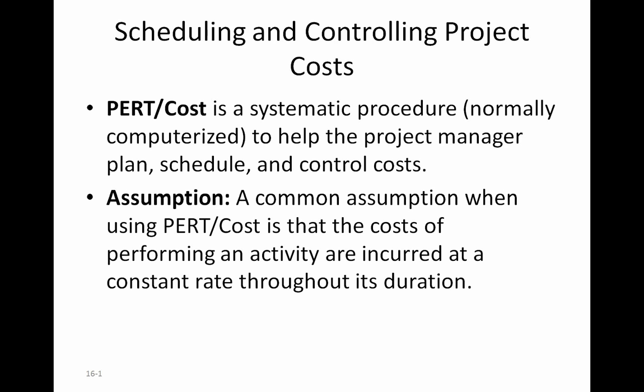But if you schedule an activity that has slack towards its latest start time, that activity is going to start a little later compared to the early start time, and hence the payment comes a little later. In other words, if you are borrowing the money from the bank, comparing early start to latest start, you can have some savings in terms of the interest payment that you would have paid on the capital you borrowed.